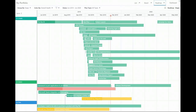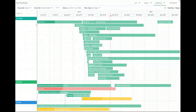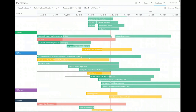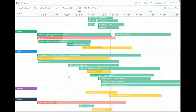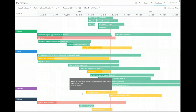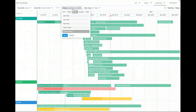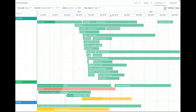There's also a very high-level roadmap view here, and it's configurable. Right now I have it grouped by stage, colored by overall health — red is off track, yellow at risk, green on track. You can also see the progress percentage on these bars with colored shading to see how far into each project we are. There are dependencies shown here — you can create dependencies between your different projects and epics, and see those lines. Hovering over one tells me what it's connecting to. I can look at this by month, quarter, year, or even by week. Once I get it the way I want it, I can print it out, or use Power BI reports to distribute to people that show the timeline slash roadmap as well.